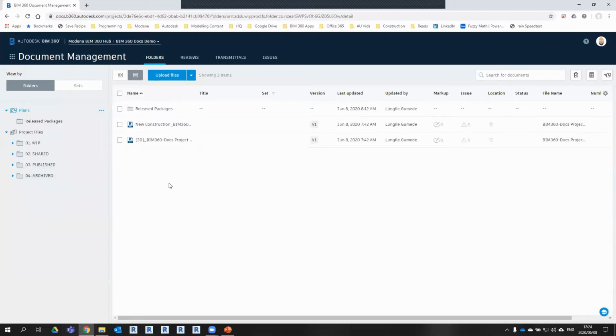Once you've uploaded your files, and like I said, a vast majority of file types can be uploaded, we get added benefits like the approval workflows, which are completely customizable to who you want to have, up to 5 steps, meaning you can have a 1-person approval process all the way to 5 people needing to approve a set of drawings.